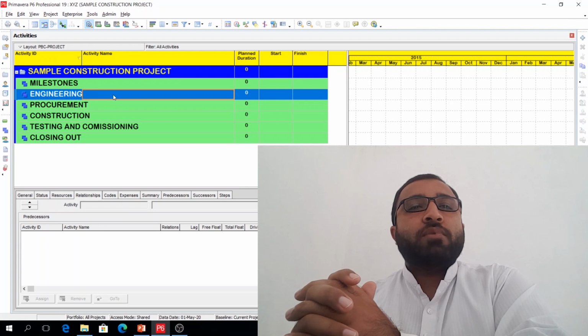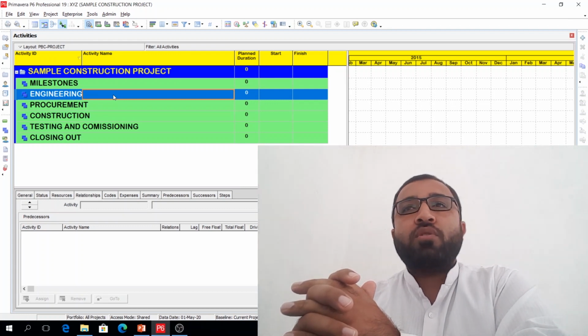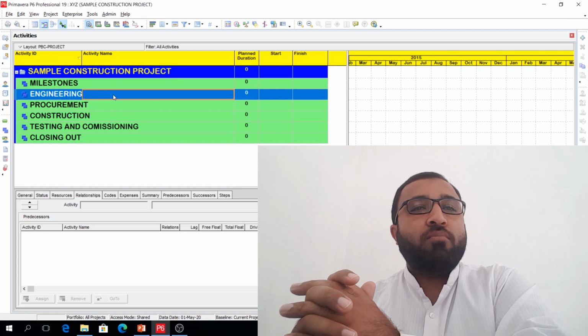Similarly, as we have divided the design approvals, we will divide the material approvals for the architectural, structural, electrical, mechanical, plumbing. So it is always better to divide your design approvals and material approvals based on the different types of work you have in your project. Here we are considering a simple typical building project.